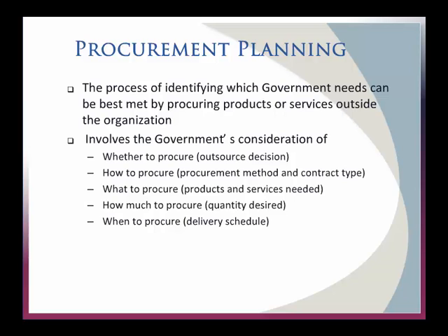And as you learn something about the acquisition cycle, early on in the acquisition cycle, things are very vague. There's a lot of risk involved. It's really inappropriate to be shifting that risk to a contractor. The government should be bearing that risk. But as you get further on and we know very crisply what we want, then it seems a lot more appropriate to have the contractor bear more of the risk.